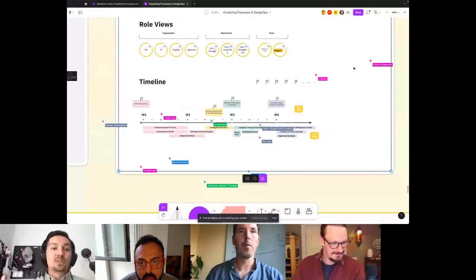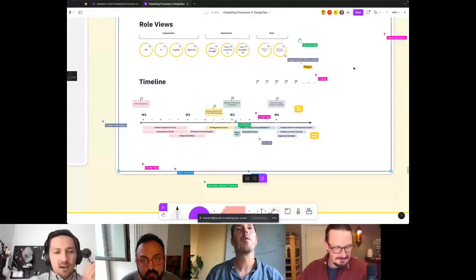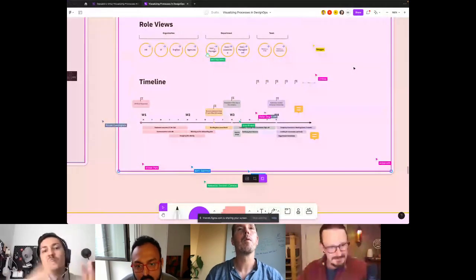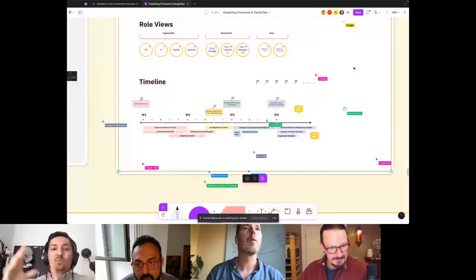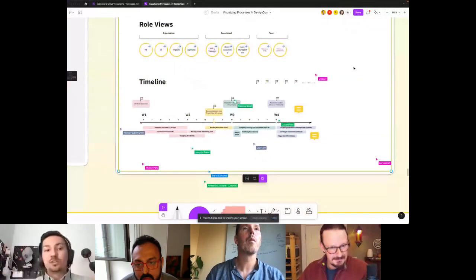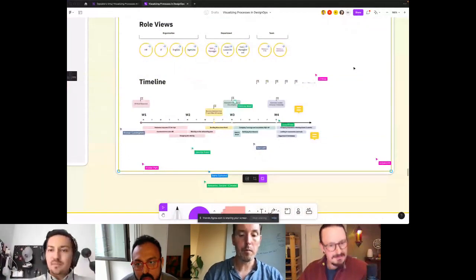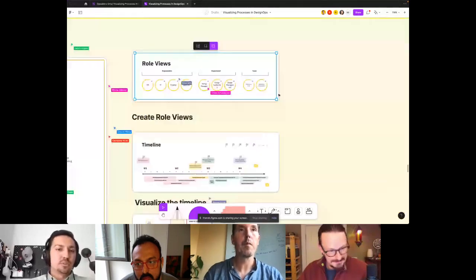So for example, when we're speaking about discovery sessions, we need like 2 weeks for preparations. We might have 2 iterations of design sprints for 4 weeks, and then we are doing the planning and prioritization for another 1 or 2 weeks. And some of the quick learnings here, again, role views are really helpful to adopt the processes.